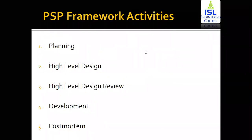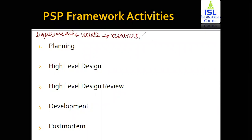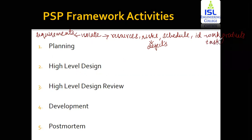Coming on to the PSP framework activities — within the PSP framework, there are five framework activities. Within the planning phase, you gather all the requirements and isolate them so they will not change. Then you identify the resources that will be required, including the risks that might occur and different defects that might occur, making a schedule and identifying the work products and work tasks that need to be followed. You also identify the different development tasks — defining the design tasks to be followed.